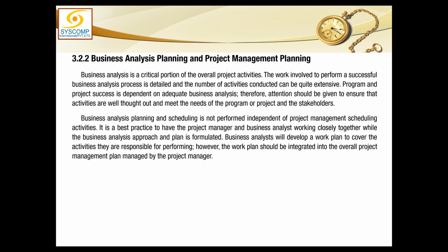Now there might be a doubt. There is no project manager when the business analyst is preparing this schedule for himself, for the business analysis planning. So what? There is no problem. When the project manager is hired, when the project manager's work starts, from that point onward, the business analyst will share his schedule with him and they will keep their schedules aligned. The project manager will take care of considering the schedule of the business analyst when he is developing his own project schedule. You got it?